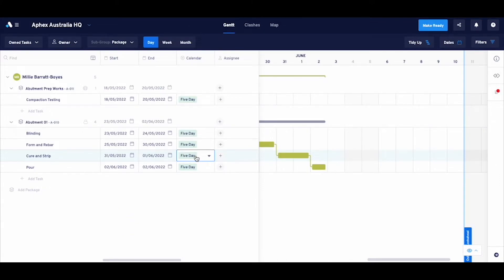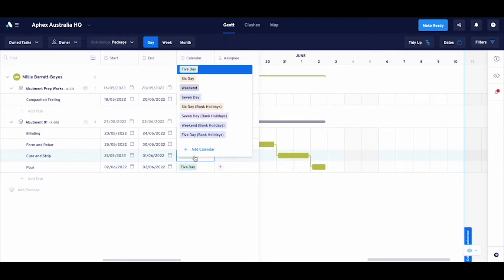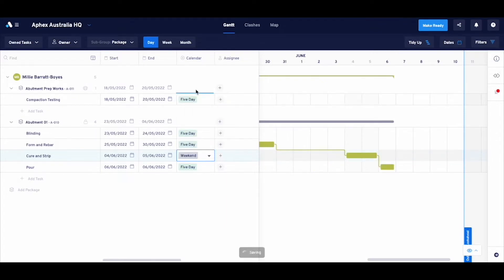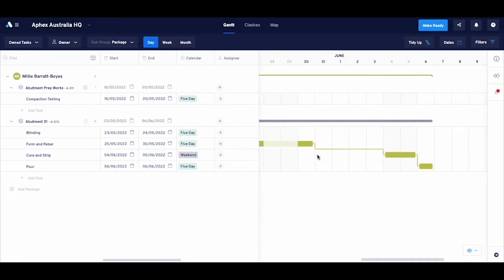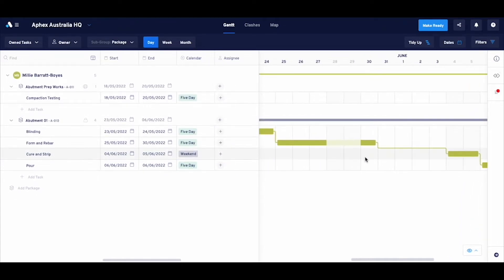I know that some of these tasks can happen over the weekend, like the curing strip for example, so I'll reflect this by using the calendar column and changing the calendar to seven-day. Nice.